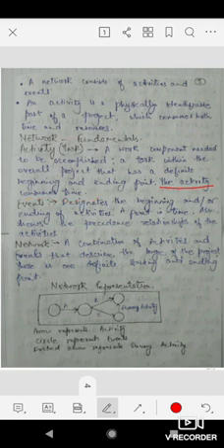What are events? Events designate the beginning or the ending of an activity, a point in time. They also show the precedence relationships of the activities. For example, here arrows are representing activities and the circles are representing events. One circle means the starting of activity A, and then we have another circle representing the finishing of activity A. The dotted arrow represents a dummy activity. I will discuss in the next slide what a dummy activity is.